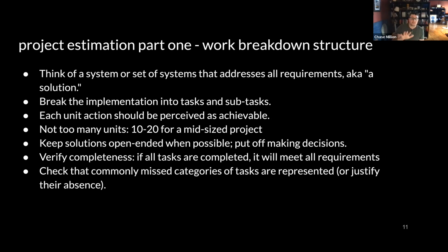The steps to creating a work breakdown structure are, first of all, figure out a technical solution. Up to this point, you should have avoided the temptation to commit yourself to some specific technical solution. At this point, you should pick one. You may pick a few, find the one that you think is most likely to lead you to success. At this point, you can always revisit this step.